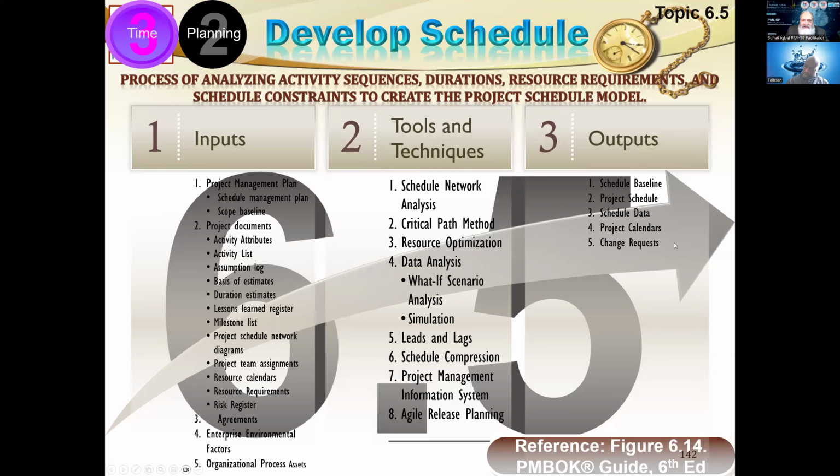Things and circumstances change, and based on that, we have to raise certain change requests, and the baseline can also be changed. So change request is a common element which will result in changes to the baseline. And this is how we keep revolving in this process and keep refining our schedule.